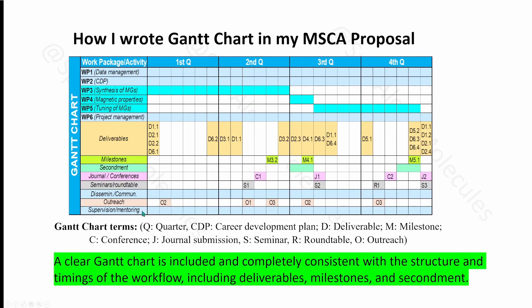I added a supervision and mentoring section for PhD or master's students in my host lab, continuing for 24 months. I also included a legend explaining the abbreviations used in the Gantt chart: Q is for quarter, CDP for career development plan, D for deliverable, M for milestone, C for conferences, J for journal publication, S for seminar, R for round table, and O for outreach.